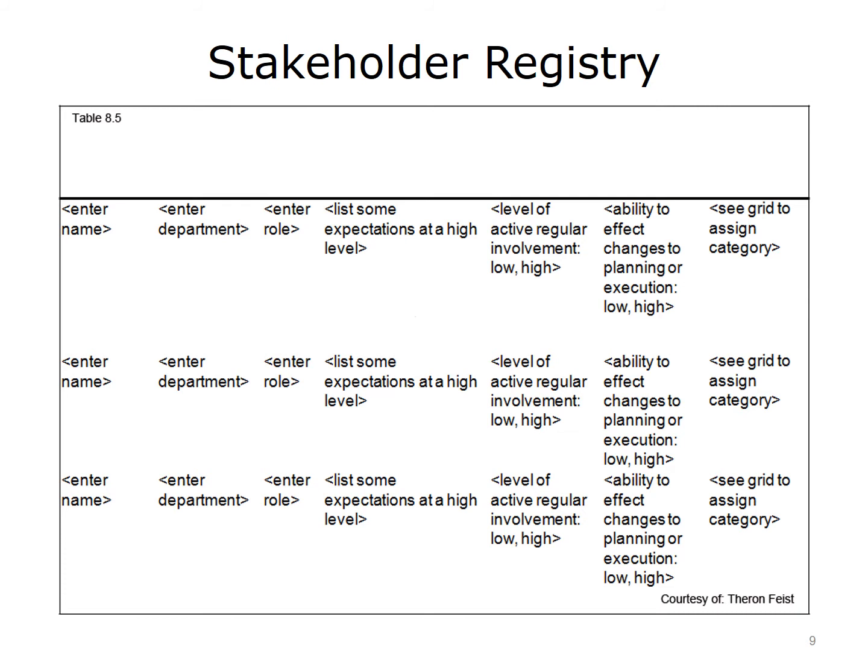A stakeholder is defined as anyone who stands to be impacted by the operations and deliverables of your project. The Identify Stakeholders process pinpoints anyone or any institution with a potential effect on the project. These stakeholders may consist of clients, project staff, or consultants. Stakeholder analysis graphs stakeholder interest along the x-axis and the stakeholder power along the y-axis. The following steps can be used to create your project stakeholder registry.